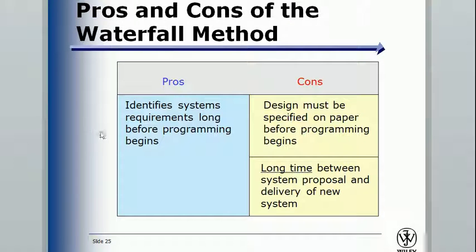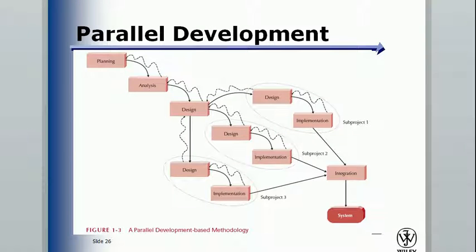Waterfall development is like a waterfall — you start from planning, fall into analysis, then design, then implementation, then to the system. These four are also interconnected and can work in reverse. Pros: you identify all system requirements long before programming begins. Cons: design must be fully specified on paper before programming starts, and there's a long time between system proposal and delivery because you go through all four phases without writing a single line of code.